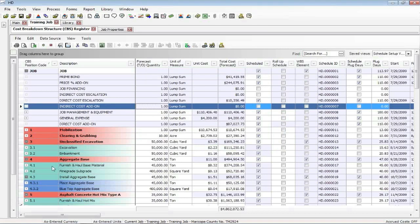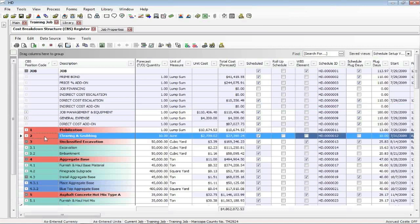So effectively, we're trying to help you schedule the job without having to manually set up all that stuff in the schedule. First, decide what cost items you want. We'll send out pertinent information. Do your schedule. Bring back the dates. Close the schedule down. Open up independently if you like. So we're just trying to give you more efficient ways to have the estimate in sync with the schedule.